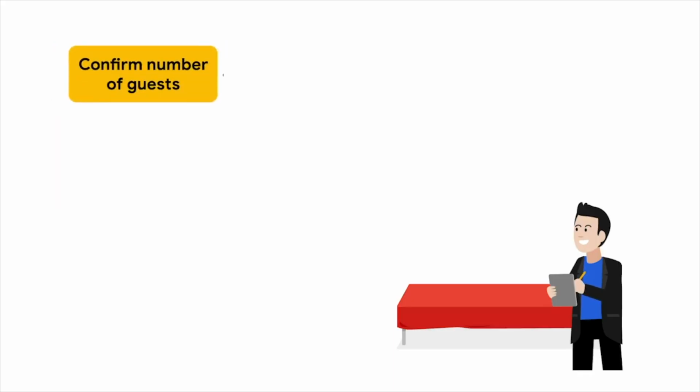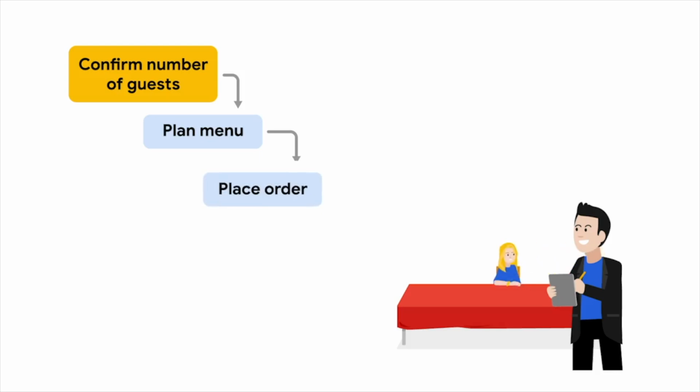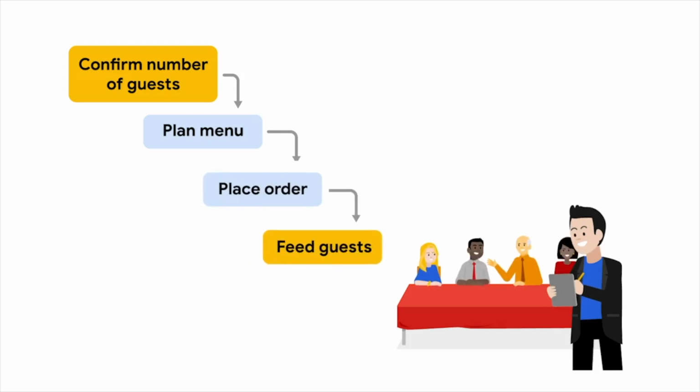For example, if you were catering an event for a client on a very tight budget, you might want to use waterfall methodology. This way, you could confirm the number of guests first, then very clearly define the menu, get approval and agreement on the menu items and costs, order the unreturnable ingredients, and successfully feed the guests. Because the budget is limited, you can't afford to make changes or waste food. The traditional method won't allow for the client to make changes to the menu once the order has been placed.